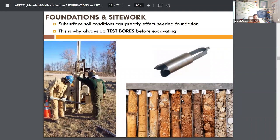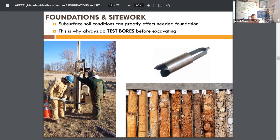If you're a developer or land speculator, the first thing you want to do is make sure it's developable soil, so you do test bores. Test bores assess load-bearing properties and structural conditions — finding rock and things — as well as the soil's ability to support a drain field for septic systems. In Pennsylvania, you also have to treat roof runoff essentially as effluent in a septic field. You want to understand your subsurface conditions before you ever buy land — it may not be developable, or it could be very expensive if you're on solid rock and have to blast it. Often before you buy, you offer to pay for test bores as a condition of your bid.